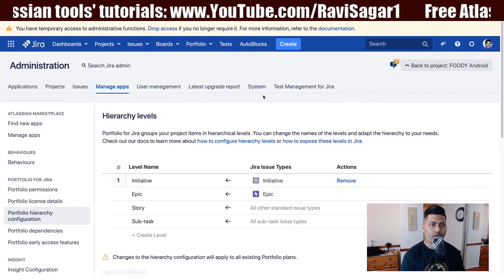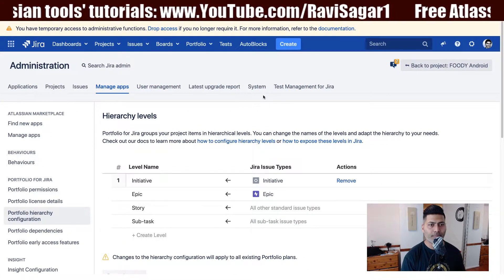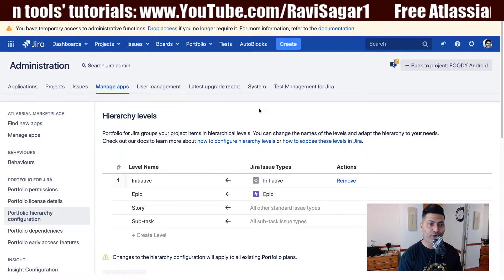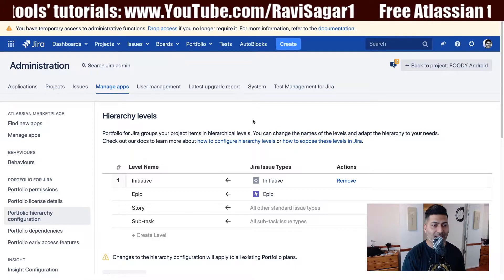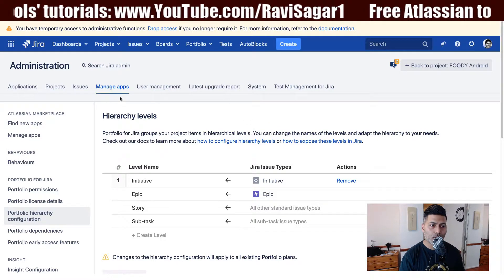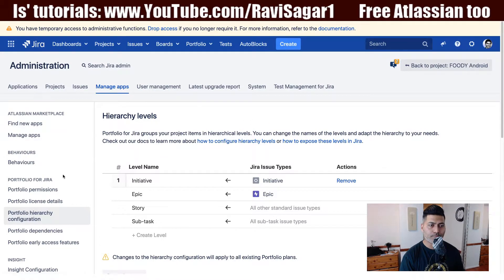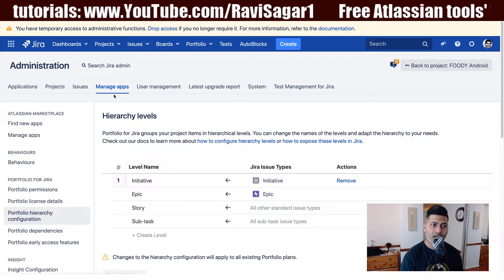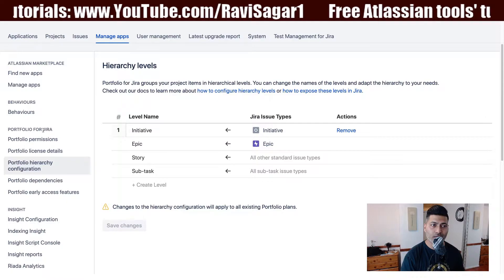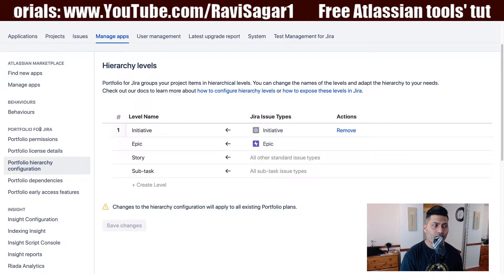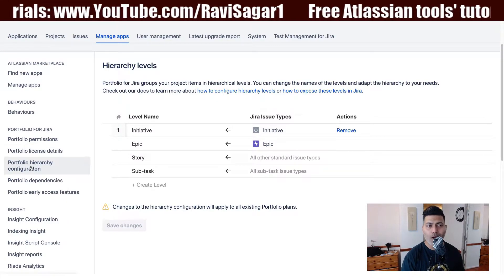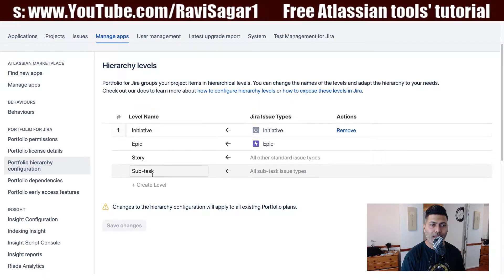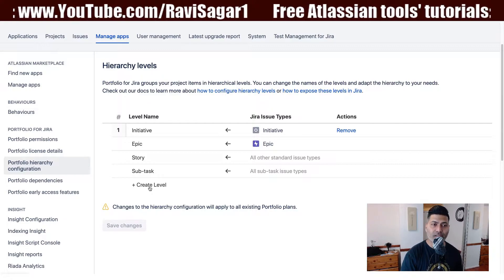Let us move on to our Jira instance. The first thing you need to do if you want to add a new portfolio hierarchy level is go to your portfolio configurations — portfolio administration. When you go to Manage Apps, you will find a Portfolio for Jira section on the left-hand side with the portfolio hierarchy configuration.